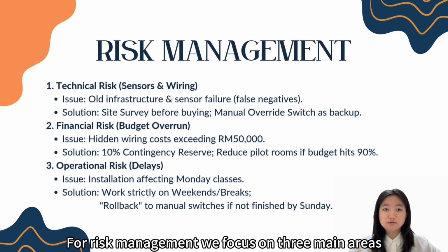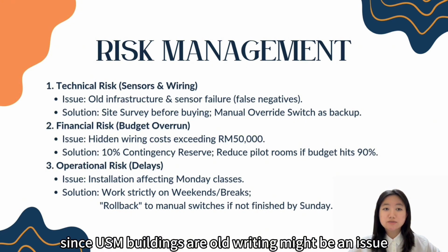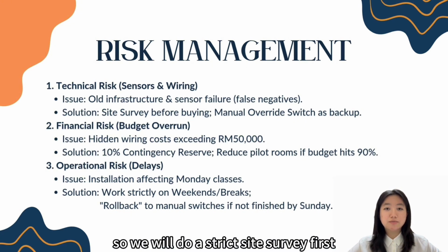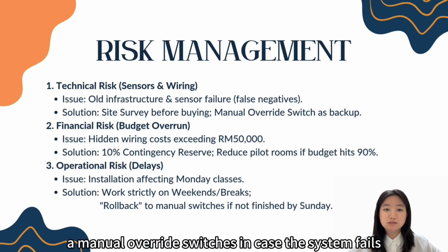Hi everyone, for risk management, we focus on three main areas. First, technical. Since USM buildings are old, wiring might be an issue, so we will do a strict site survey first and install manual override switches in case the system fails.